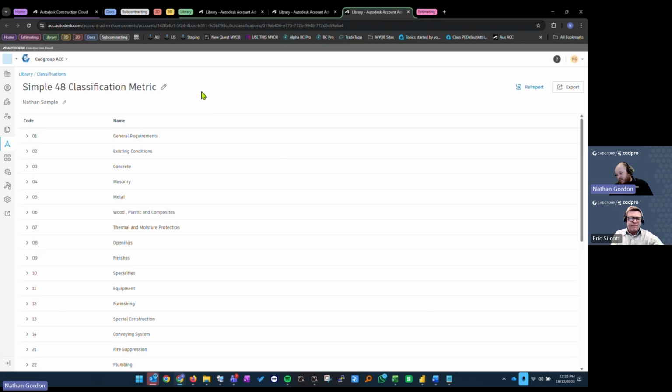So with the recently launched ProEst import into the estimate feature, you can absolutely use takeoff in ACC as a quantity and then use ProEst estimating for your costs, or even vice versa, really, ProEst takeoff into ACC estimating too. So both ways can work. It's, yeah, I guess a case by case basis to determine which is the best option.